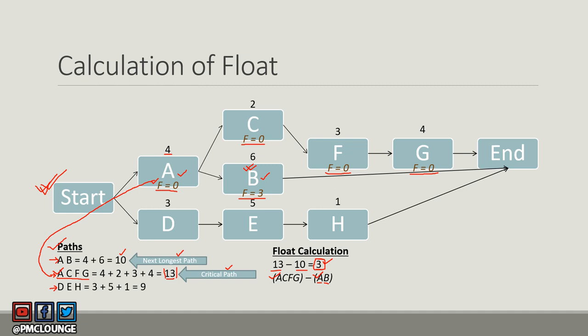Now let's calculate the float for the last path, DEH. Using the same approach — critical path minus path value: 13 minus 9 equals 4. So the float for activities D, E, and H is 4. This is now reflected in the diagram.